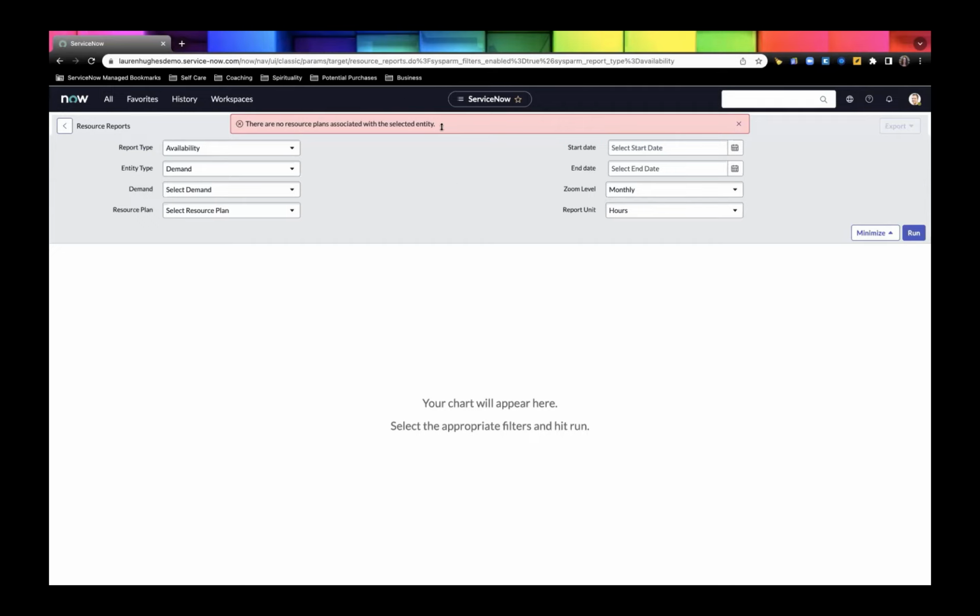Can we see a plan versus actuals in this resource report? So let's see. What we would look at there is our forecasted and committed utilization. Forecasted would be our plan, committed would be our actual committed, but we're not going to see our actuals that are hours that have been burned there. That's the closest we can get from the specific report.